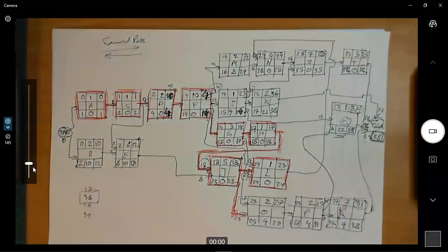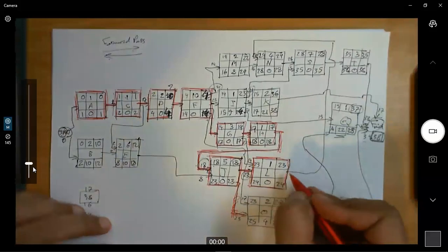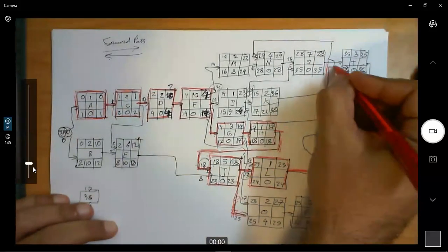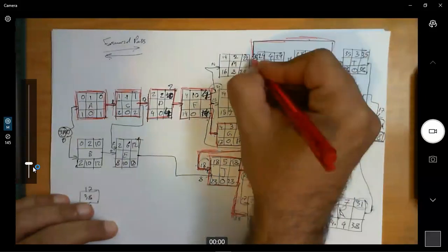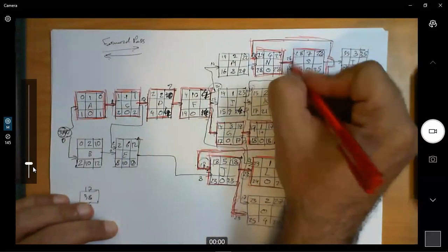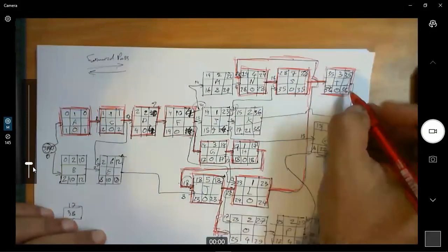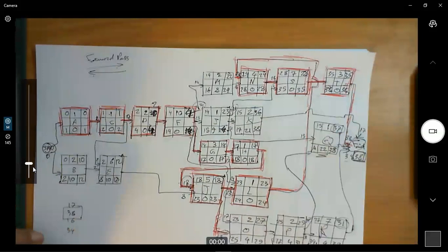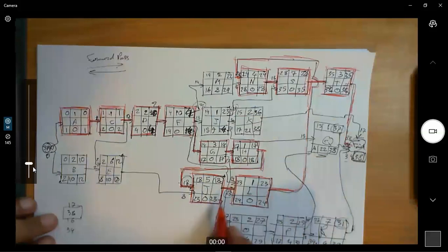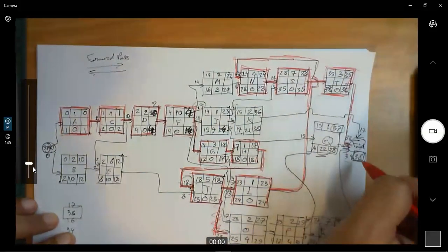How did we come up with this as 23? This should be, okay, no, we are right. It should be L to I, right? Here, up to N. From N to S. Okay. From S to T. From T to finish. You see? So we went A, C, D, F, G, H, J, L. This one is just a mistake. Then from L to N, S, T, then finish.